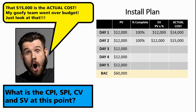Let's apply some earned value basics to these metrics. What is the cost performance index, schedule performance index, cost variance, and schedule variance at this point? You know what the planned value is — $12,000. You know what the earned value is — $12,000. And the actual cost is $15,000. CPI is earned value divided by actual cost. SPI is earned value divided by planned value. Cost variance is earned value minus actual cost. Schedule variance is earned value minus planned value. Do the math.